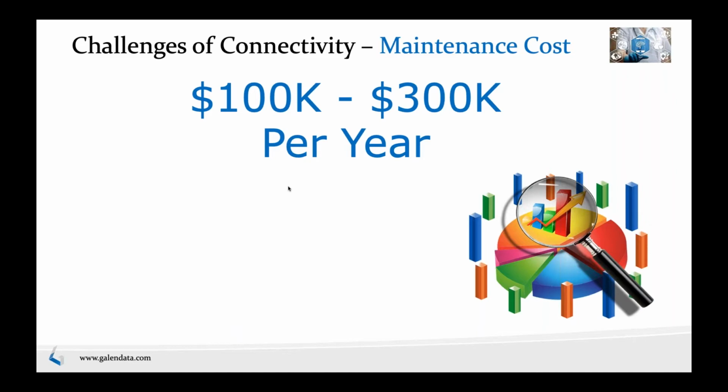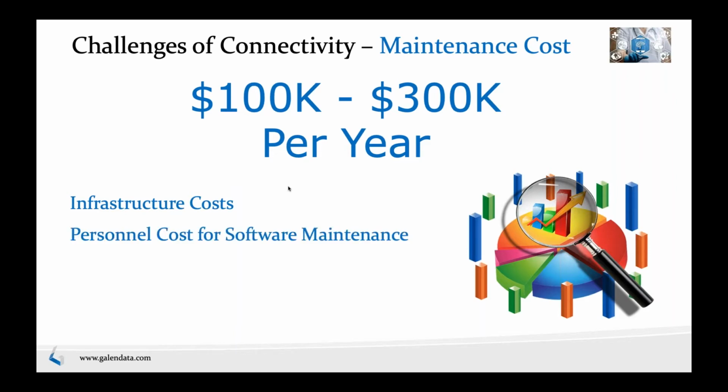And that includes the cost of the infrastructure, like servers, storage, bandwidth, backups of data, and your development team that is maintaining that product, because as you deploy, stuff will show up. There'll be defects, there'll be requests for new features. You've got to keep maintaining that if you want a good user experience. And then the IT management, cybersecurity monitoring, disaster recovery, patching your servers, making sure everything's running properly. All that cost can quickly be an overwhelming amount of your budget for the cloud connectivity.